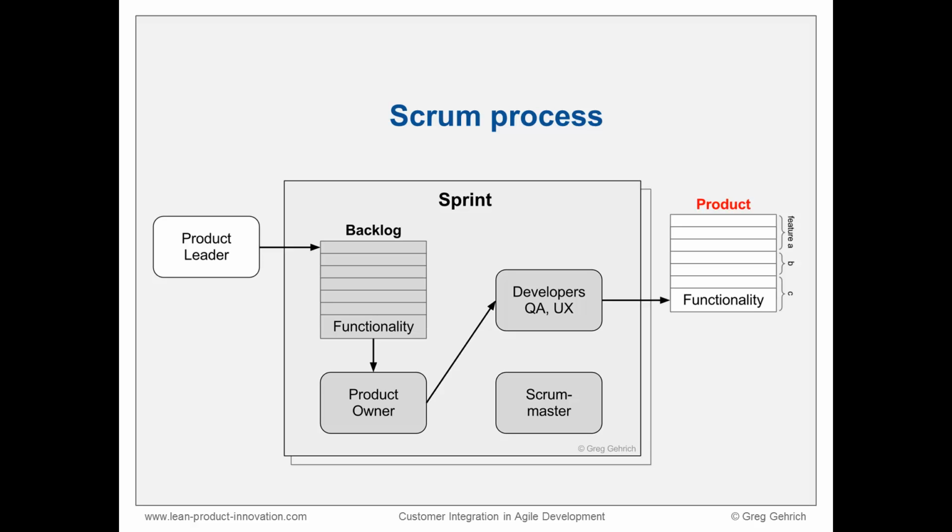The terms flow and Kanban are used to describe the balance of work through and across the teams. To support this, the work is initially allocated in a way that leaves a little slack time in each sprint. If resources become constrained in one of the teams, this slack allows resources to be loaned as needed to balance and maintain the flow. Now, this is a high-level outline of a typical Scrum development process. In upcoming sections, we'll learn more detail about these activities, timings, and interactions.